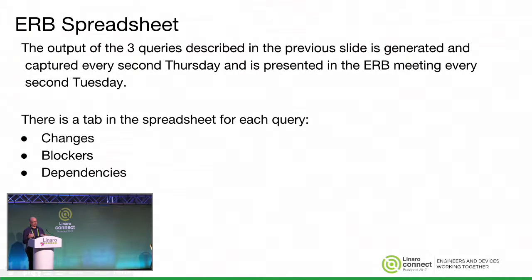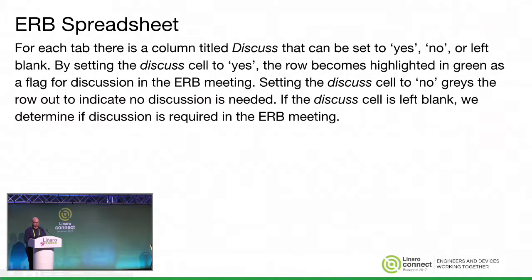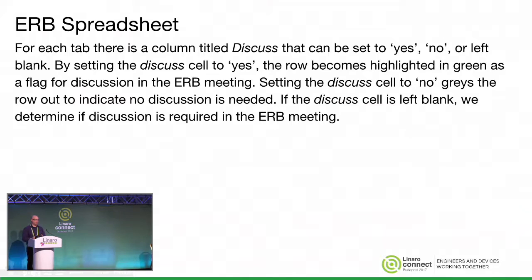The ERB spreadsheet is what's presented in the ERB meeting. The three queries each generate a tab. Sergey's script generates the changes tab, then the blockers and dependency tabs follow. Every second week we go through these. On the spreadsheet, there's a column called 'discuss' with a yes or no. If you click yes, the row highlights in green; if you click no, it grays out so you can see it but know it's not important. Clicking yes or no is at the discretion of the project managers and directors.